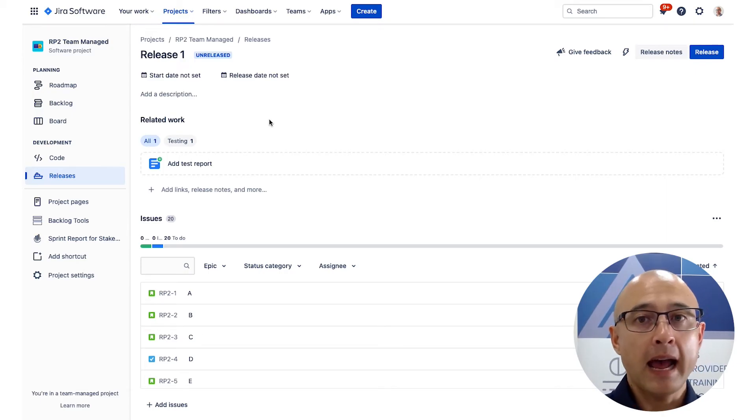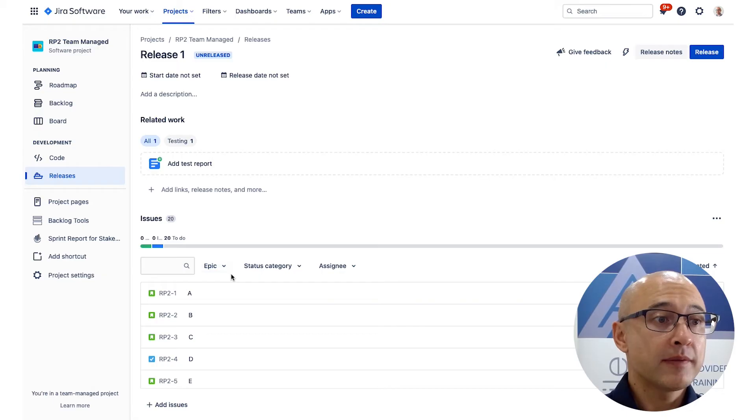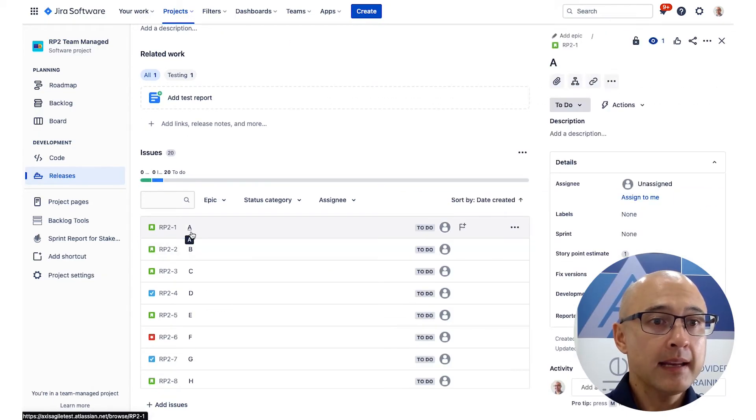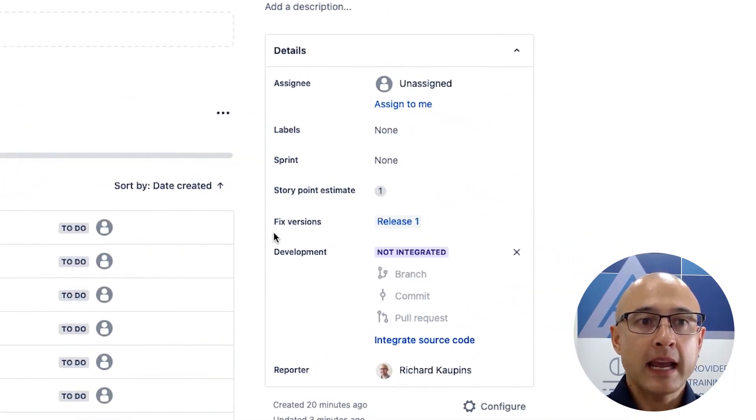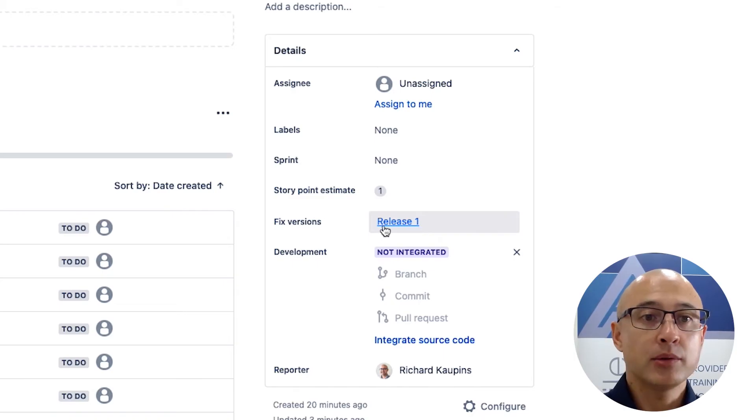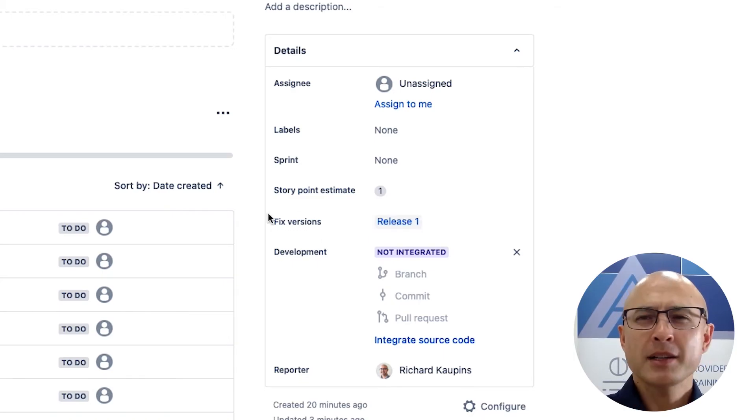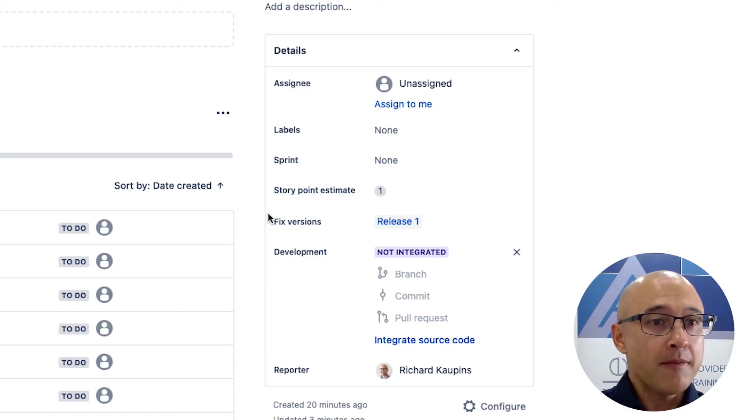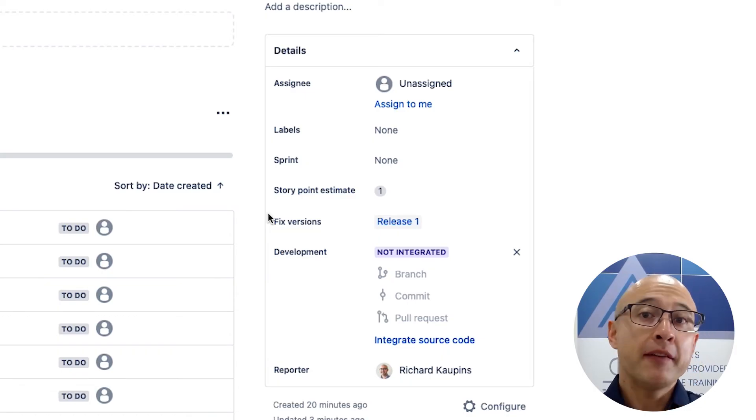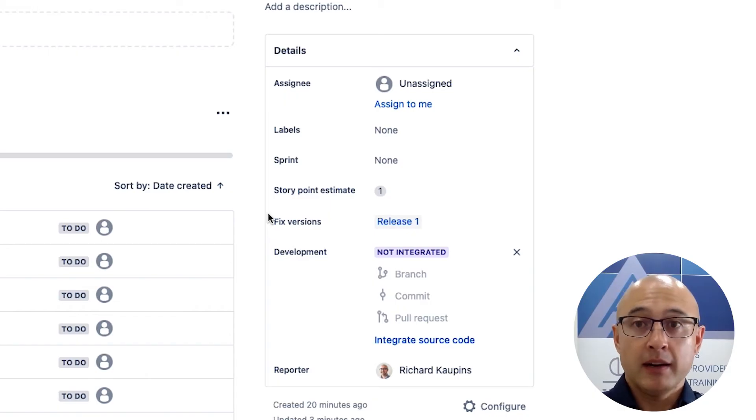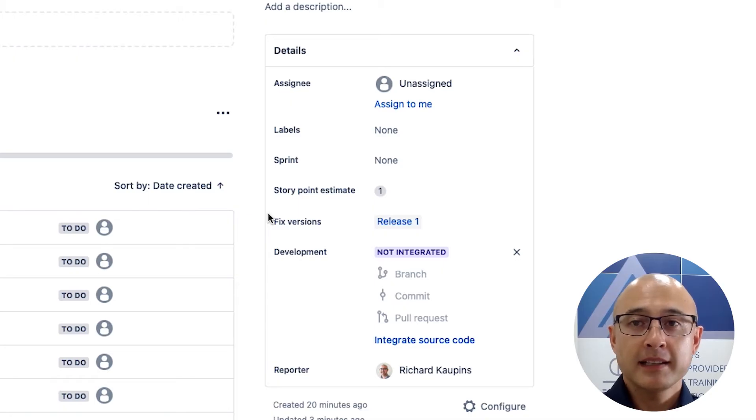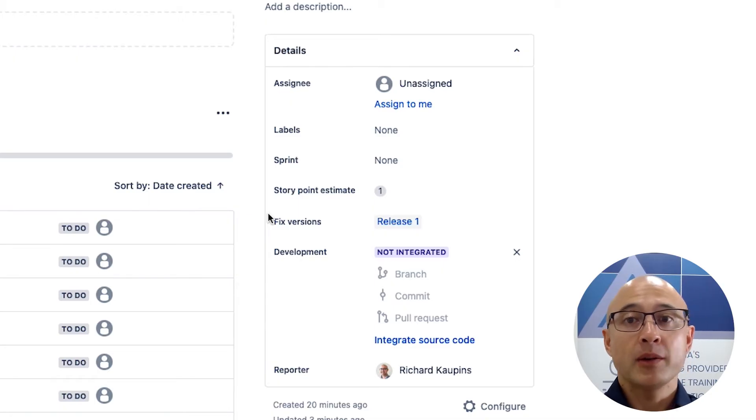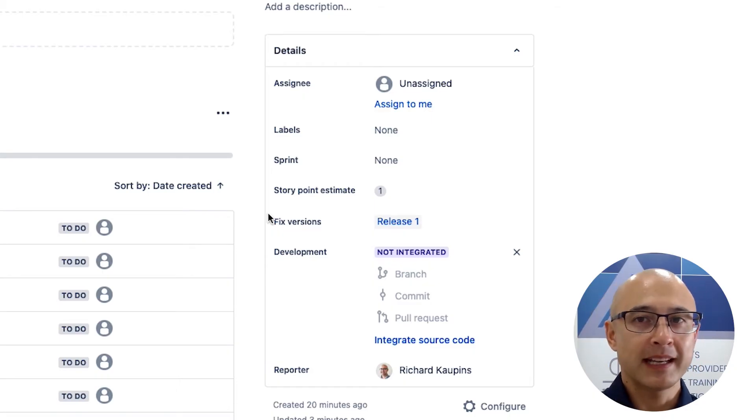Now, the other way that you can add items to a release is actually by editing the actual issue, the item. So for example, if I click on A here, you will notice that there is a fixed versions field. So I could just edit that field and add it to a potential release. Now, you might be wondering, why is it called fixed versions? And why didn't they just call it version? Well, the reason is that for bugs, there is actually a fixed version and an affected version. And the idea is that if a bug is introduced, we're going to pinpoint the affected version where it was detected. And then we're going to have the version where it was fixed, hence affected version and fixed version. So that's why they've called it that.